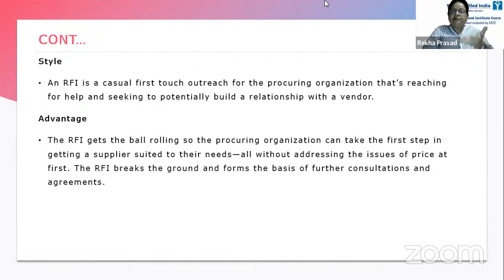So RFI gets the ball rolling so that the procuring organization can take the first step in getting a supplier suited to their needs, all without addressing the issue of price at first. First, don't jump into the price. First, you negotiate whether they are able to supply the quality and the things needed by your organization. Then, once that is settled, price can also be negotiated. The RFI breaks the ground and forms the basis of further consultations and agreement.